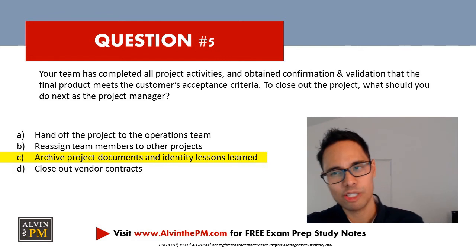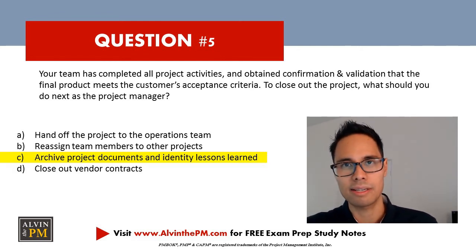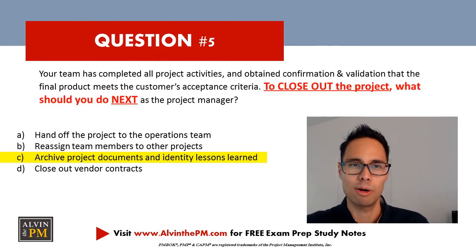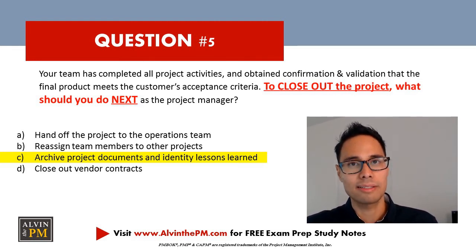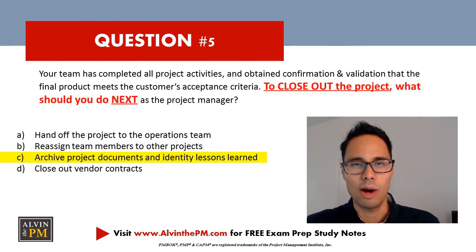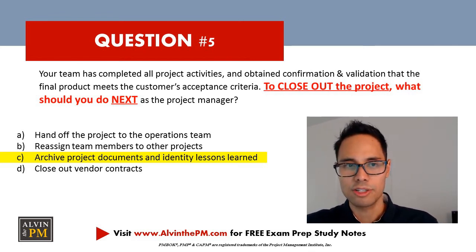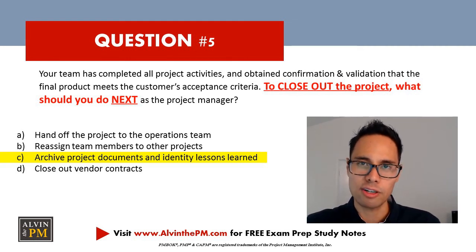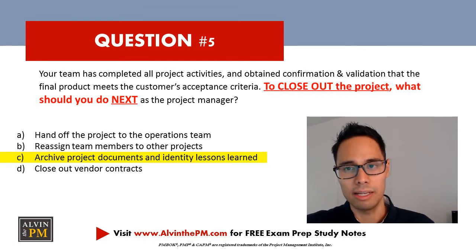This question can be tricky, especially if you have trouble recalling all the different events which take place during the closing phase of a project. But remember, this only applies specifically to the predictive waterfall projects. On your exam, you may expect to see a question asking you details about the activities for closing out a project. And when it does, keep this in mind. This question here is specifically asking you what should you do next. So make sure you focus on the very first thing that you would perform. The first thing that you would do is archive documents and update lessons learned.